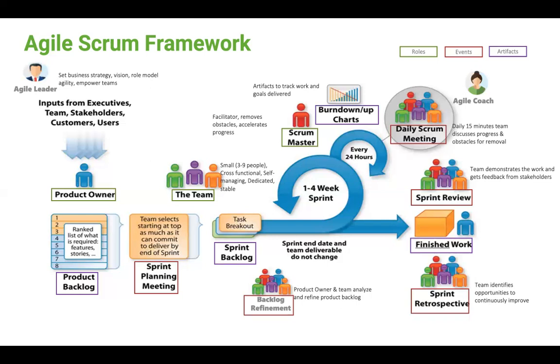And that's why we talked about what we call DOR. What is DOR? Definition of ready. And when we now make sure that we've done this, it's after we have enough stories refined, then we are able to take those stories into sprint planning.